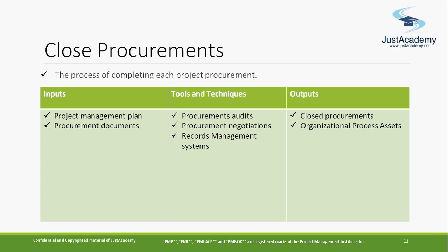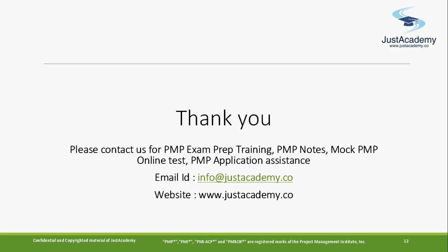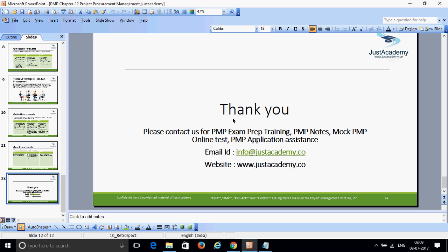You are going to close the procurement, and then you will update your organization process assets with any lessons learned and any contracts. Whatever agreement and contract you created will be stored as part of the organization process assets. That's good. So this is one of the simpler topics.